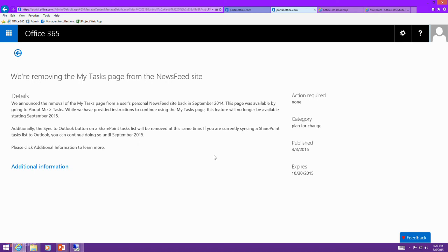You're working on a backup option because I'm wondering about retiring and removing old projects so I don't have the clutter on my dashboards. Right. So I just actually want to step back. I'll answer your question because that's a great question, but I want to make sure it's clear to everyone. We do backups and data recovery for the PWA instance. I don't want anyone to leave the room with the impression that we don't have enterprise grade service reliability. We definitely back up everything. We can restore everything up to 15 days. So if you do run into a problem, we can revert your site back. It's about a 15-day window, so call us quickly.